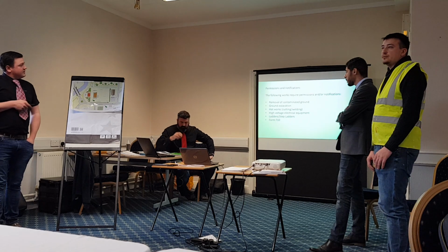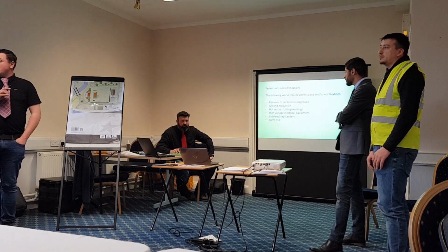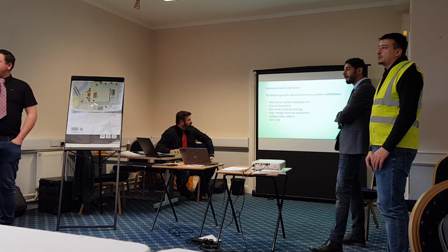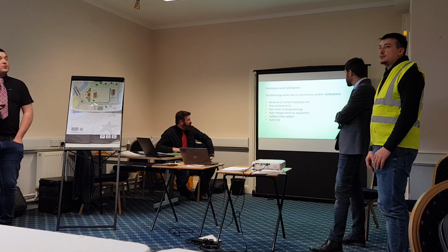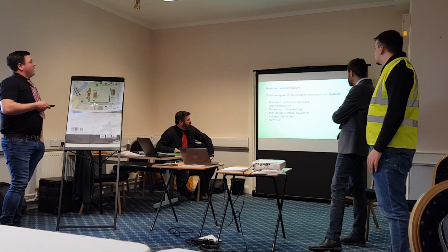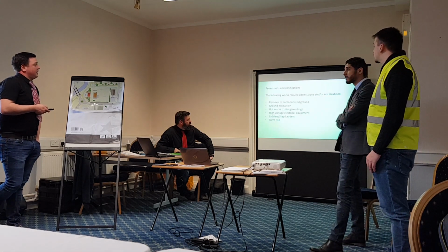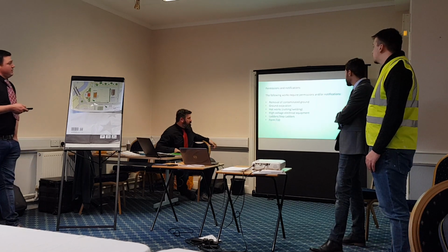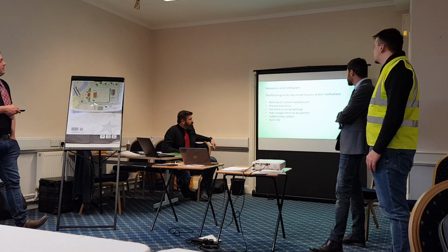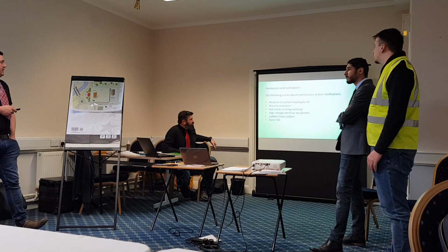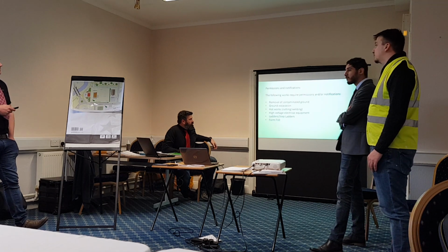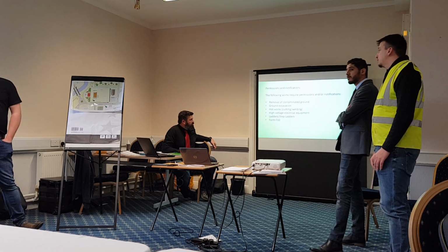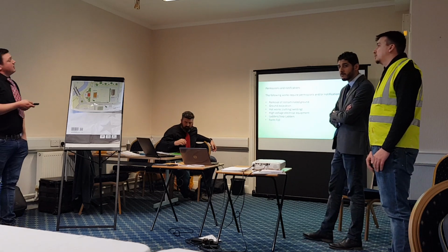If any services are found and not on the drawing, all work will cease, and we will have to go back to the utility suppliers for more information. All hot work, cutting and welding will require permits. High voltage electrical equipment will need an electrical permit. Ladders and step ladders will need a working at height permit. This also includes any scaffolding, newts, and any cherry pickers that come on site.